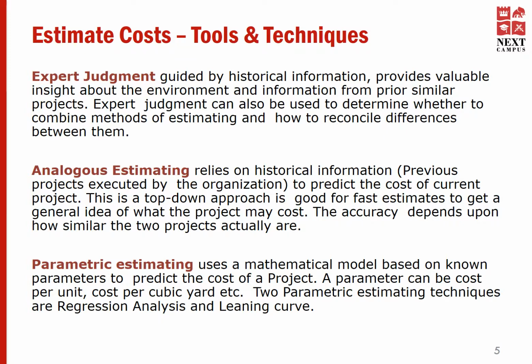Parametric estimating. Parametric estimating uses a mathematical model based on known parameters to predict the cost of a project. A parameter can be cost per unit, cost per cubic yard, etc. Two parametric estimating techniques are regression analysis and learning curve.